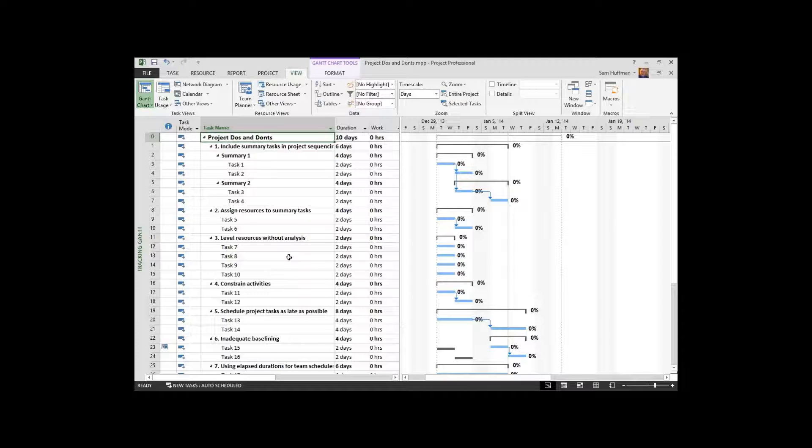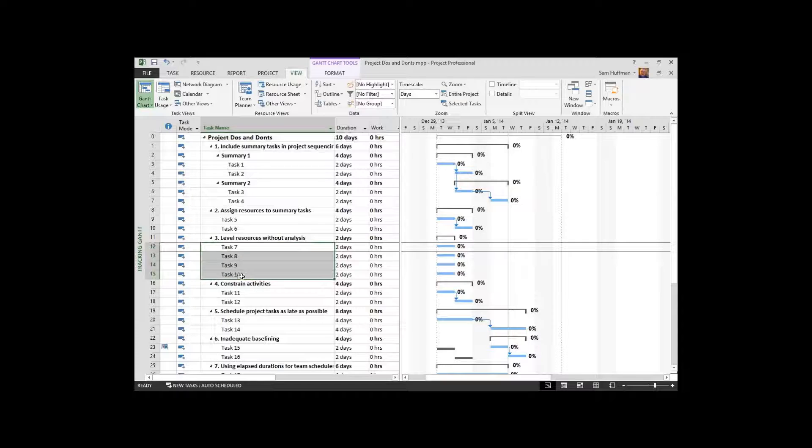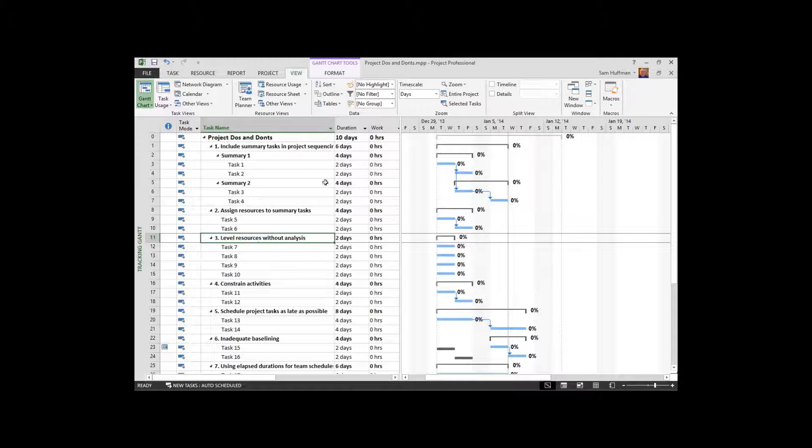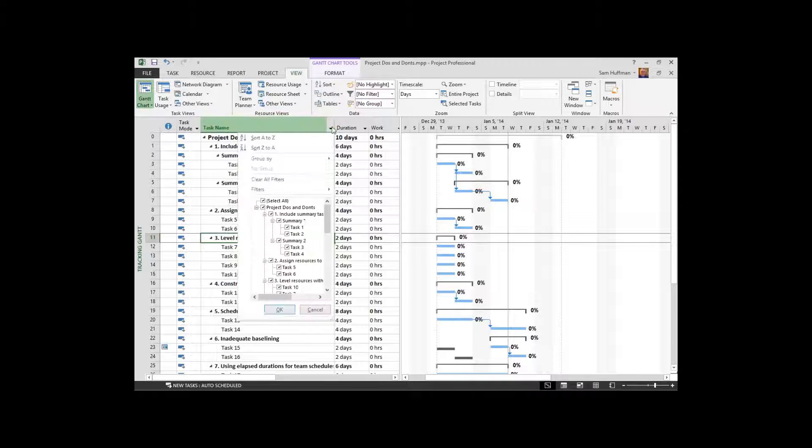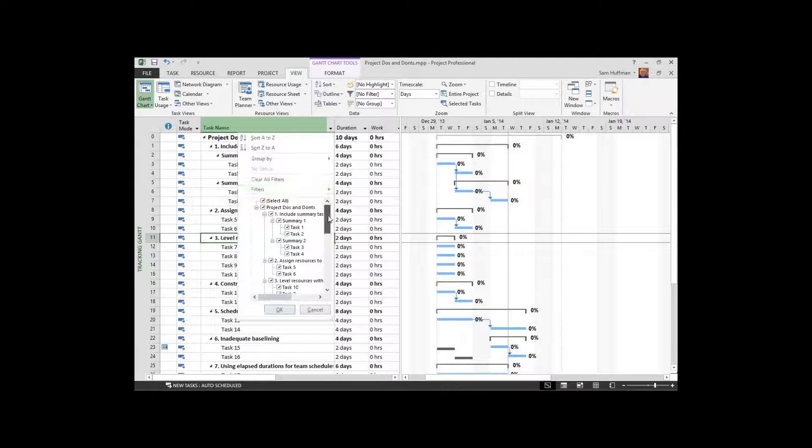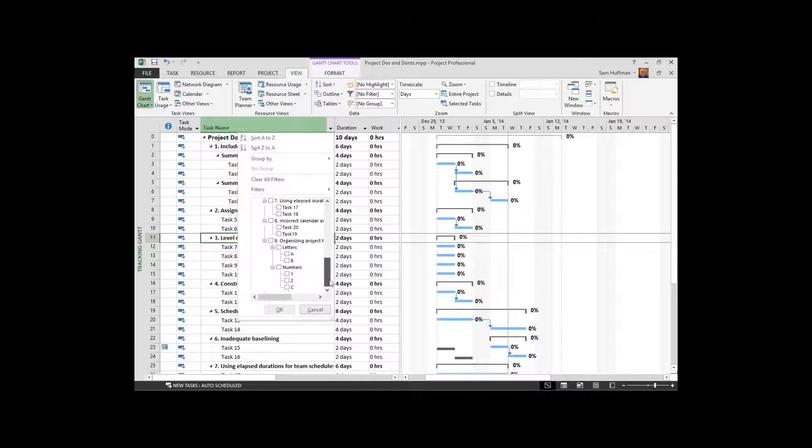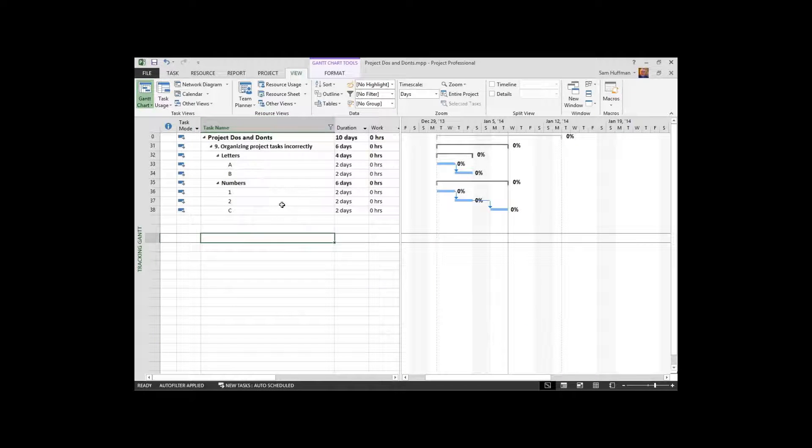The couple of rules of thumb here is that the tasks in any given level should add up both numerically and contextually to what's represented at the summary task level. Now let me show you what I mean. And I tried to make this as easy to understand as I could here.